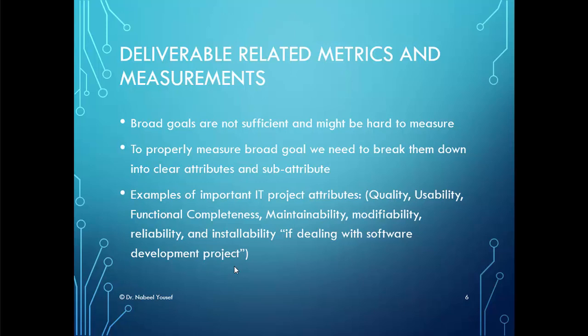Looking at deliverable-related examples, we can find that quality, usability, functional completeness, maintainability, modifiability, reliability, and installability — which is for software development only — are all considered deliverable-related metrics. If these attributes are hard to measure, we can break them down to sub-attributes and attach the proper metric to each one.